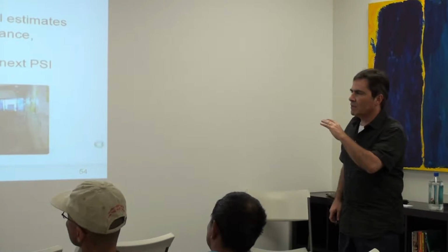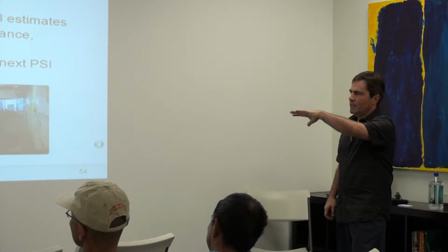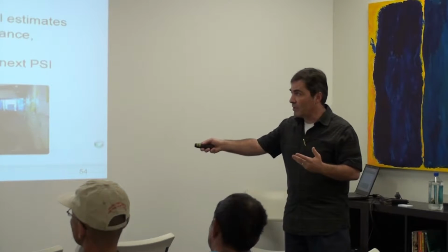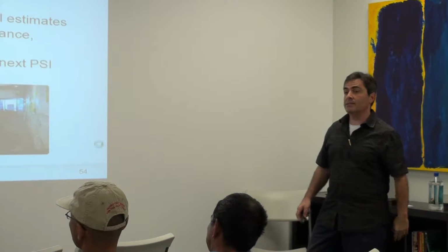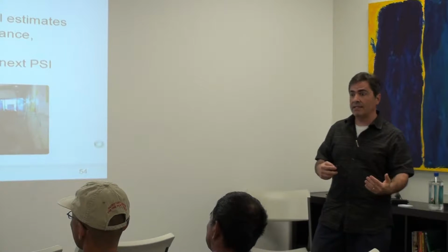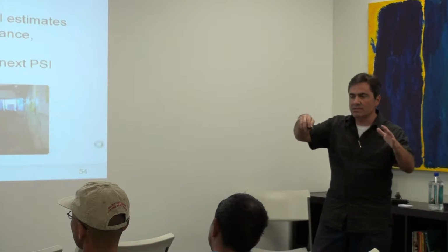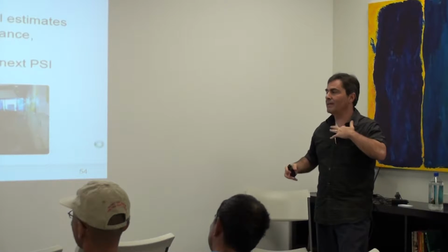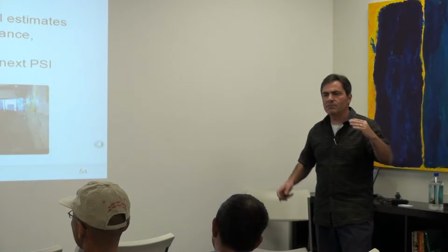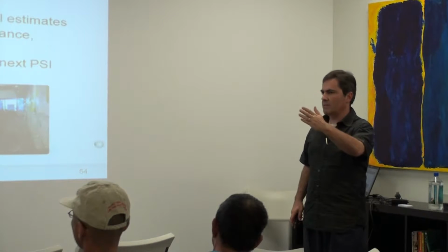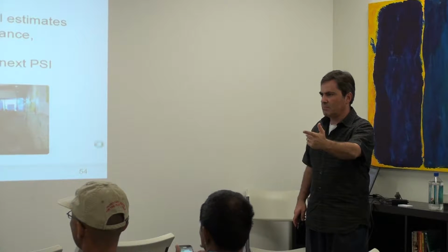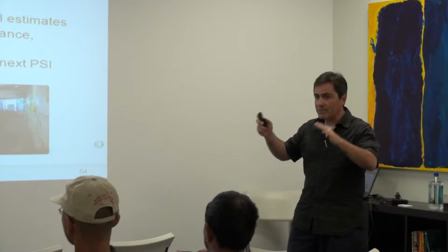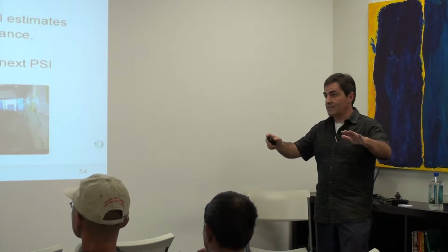And so these meetings are quite the events. If you're working with an offshore partner, you'll usually have them on display. You'll have a team over there that's staying in sync with the team on this side. Teams will sit at tables, like round tables, so that they have the ability to communicate and plan. The reason we do this all at once, all together, is because we want everybody in line of sight of one another. So if I have a dependency on your team, I can walk over and talk to you. If we need to whiteboard something together, we can do that. Everybody is at the same place, planning at the same time.